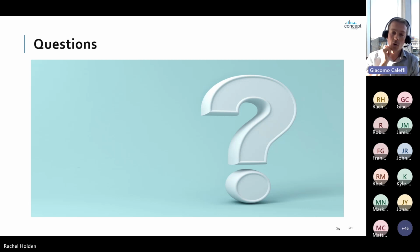We've recently concluded a study on Port Taranaki to highlight its usability as a marshalling and construction port. So we're doing all these desktop studies to start preparing the understanding of the industry. We are still maybe 1 or 2 years away from the heavyweight engineering, certainly for these structures. We could potentially next year start looking at some concept engineering, but it all depends.